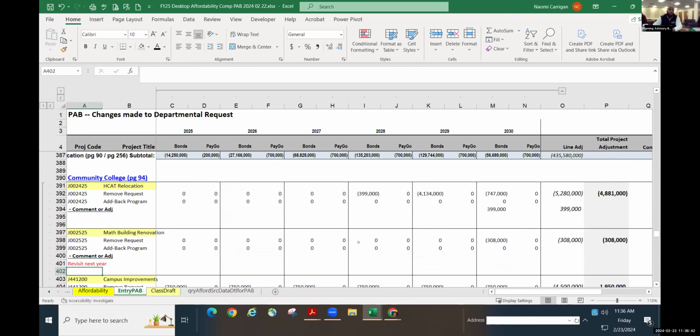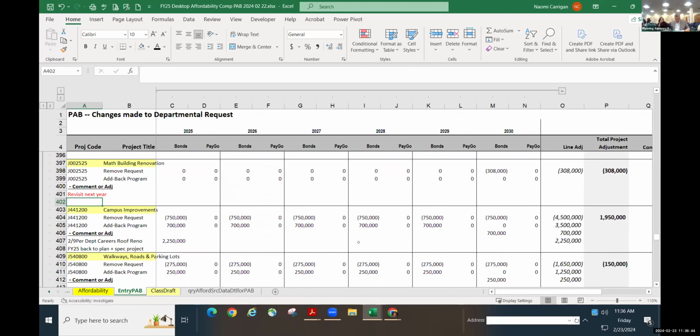So the community college is in the middle of the Dragoon renovation and addition. That's a big number. That's $57 million. Yes, that does have 50% state funding tied to it. I believe last year it was higher and they redid the scope and removed the addition. Yep. So this was the reduced number. Just wanted to disclose that. So the county impact is $28.8 million.